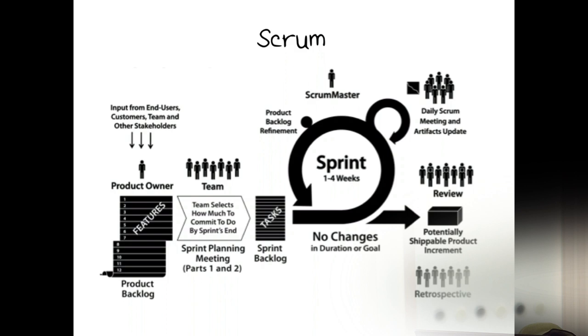It turns out that if the team selects what they commit to do, the motivation is way higher than if somebody tells them what they're going to do. And you might think that, okay, well, the team can select almost nothing. But if you select almost nothing, you don't like your job, you're not going to stay very long. It turns out that very quickly the teams actually take pride in performing as well as they can as a team.